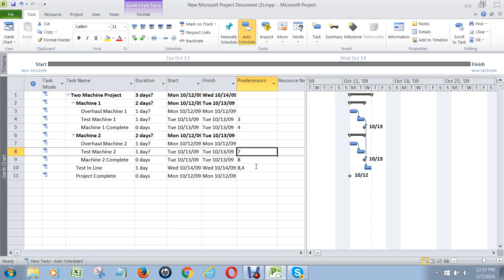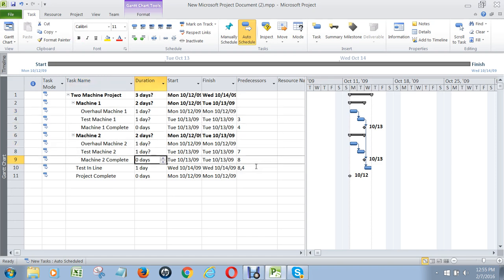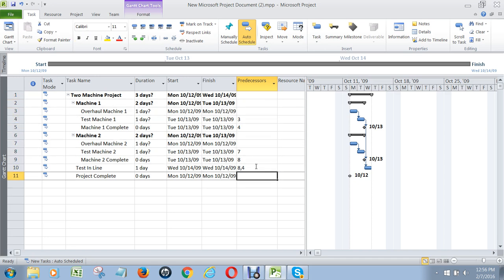And task eight — testing machine 2 — is the predecessor to testing in line. These summary tasks and milestones are just there to structure your project and allow you to use different views to condense the project for people to look at. They don't represent the work of the project, so we don't use any of them to create the project schedule. Remember: milestones have predecessors, but they never act as predecessors to other tasks. Summary tasks never ever have predecessors and are not linked up in any way — they're only there to outline the project.